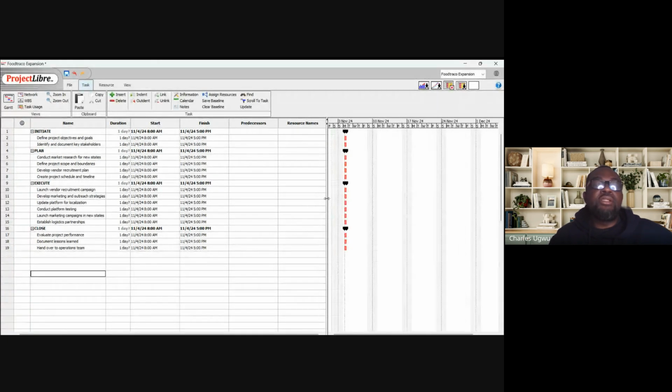So the next thing is to add the number of days you want each of these activities to be. How long do you want these activities to take? By default, once you add any item, the system will give it 1 day. It's left for you to say 2 days or 3 days. So we are going to start adding.